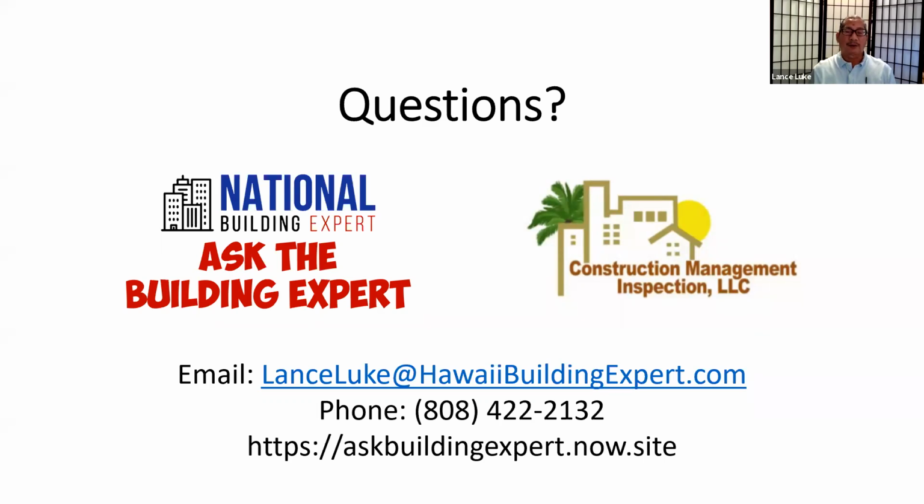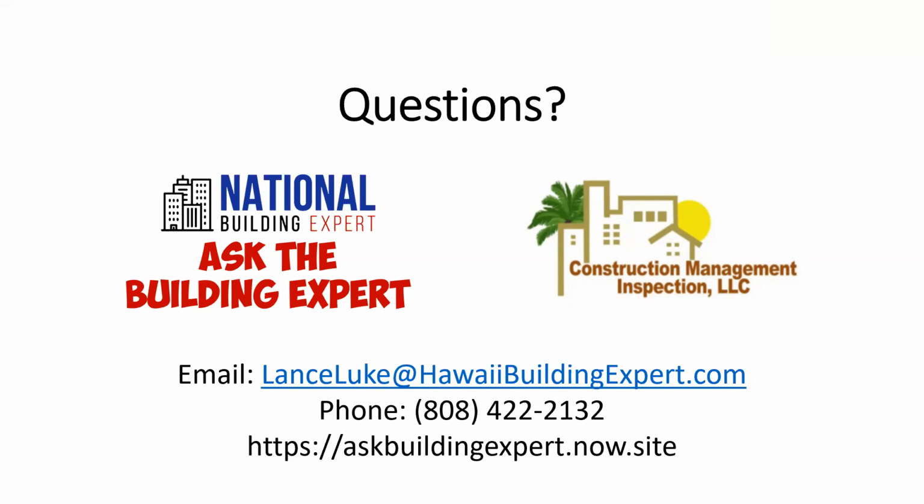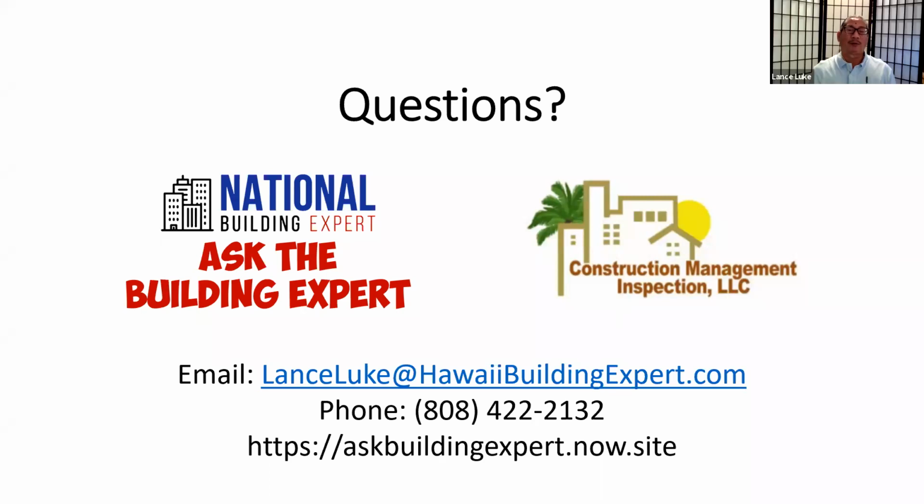And the answer is, it may sound like it's cheaper by doing maybe 10 or 20% of the building one year and then doing the other 20 the next year and spread it out for multiple years. Okay, in the long run, it's not saving you money. It's not even saving you money in the short run. And here's the reason why: the cost increases for labor and material every year.